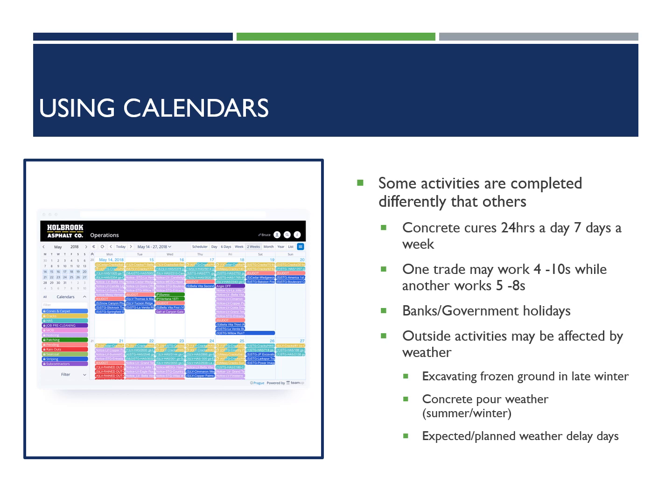This presentation is for DBEs through North Dakota Department of Transportation. You'll be working for the Department of Transportation, and they take all the regular government holidays or bank holidays. So we want to make sure that we have all those in a special owner calendar, so we're not scheduling inspections and things when there's not going to be an inspector available.